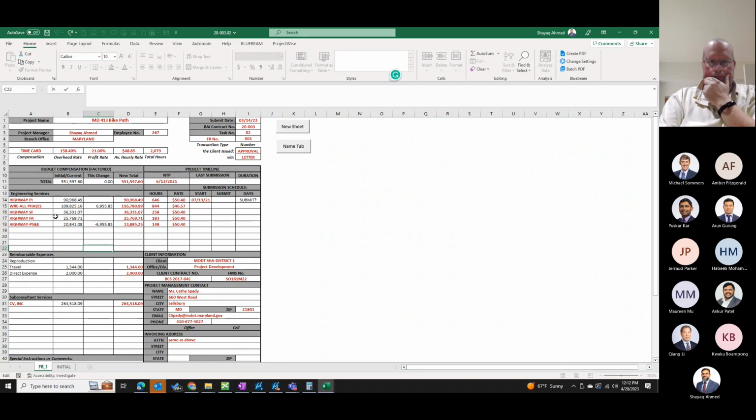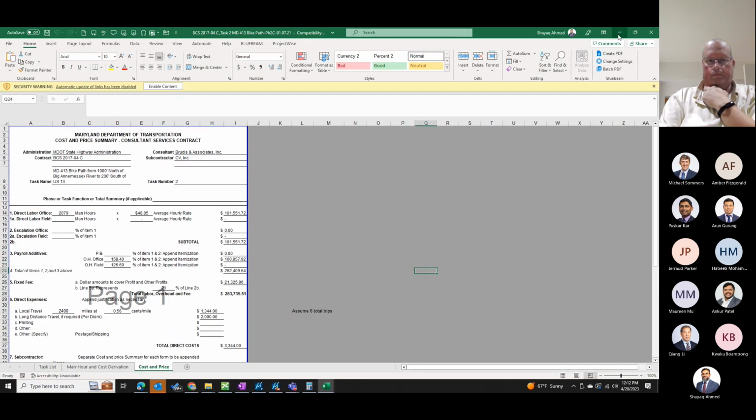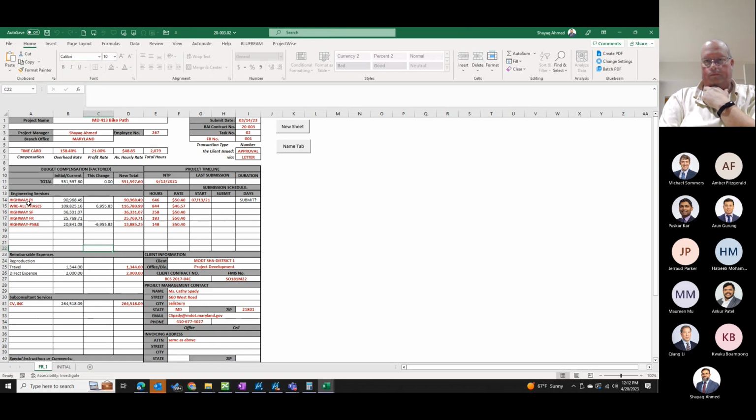You can also, if you have a job that has a bunch of different departments hitting it, like a structure budget, a highway budget, a traffic budget, a water resources budget, so forth and so on, set it up so that each department has its own budget to draw from. That helps in tracking where the projects are hitting.